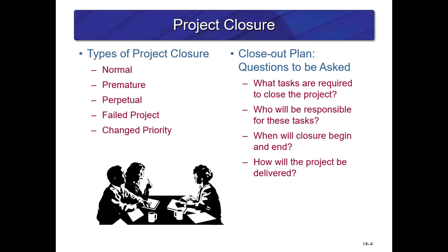When formulating a closeout plan, some of the questions to be asked are: what tasks are required to close the project, who will be responsible for those tasks, when will the closure begin and end, and how will the project be delivered.